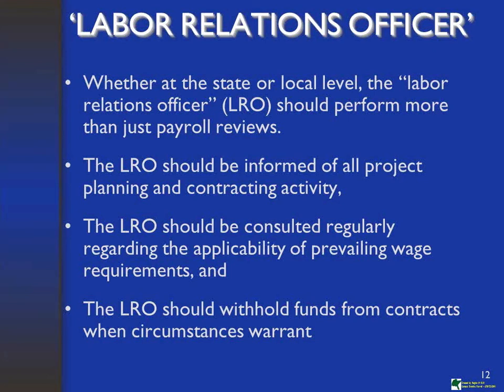Okay? And lastly down there, I mentioned this in the other session, about withholding funds on a contract. Within your ability as the labor relations officer or designee, you can cross-withhold funds, which is a manner of withholding funds on another project that the contractor may be on.